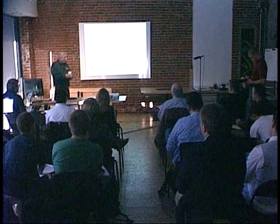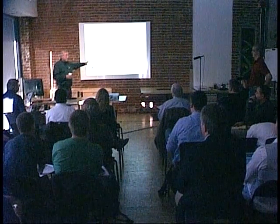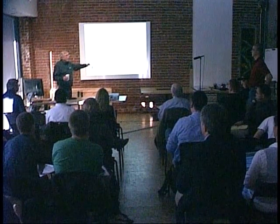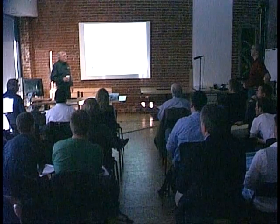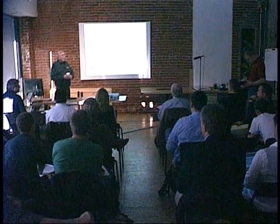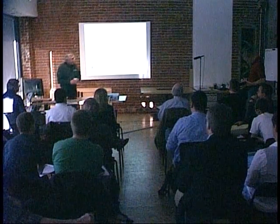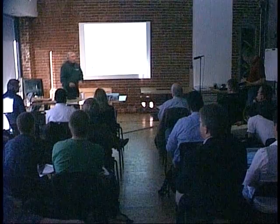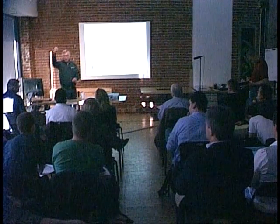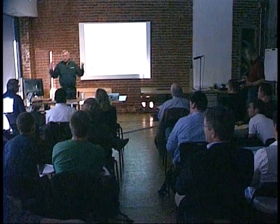And you say the equipment. I'm going to tell you again, the cost of the hardware, I think, was about $10,000. It was a lot more than that to make it work because it was labor. It was all that programming, mapping, and digging through. Mike reminded me again today that he and Dave had to go point by point through the building to identify their points because our documentation was just not there.